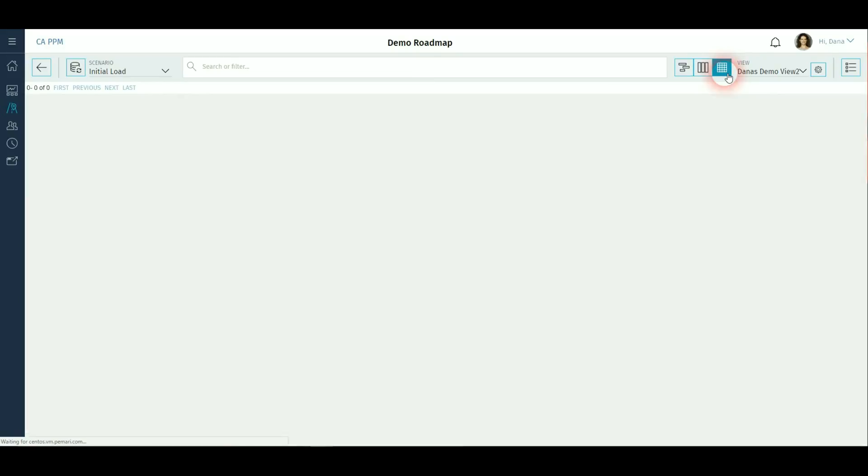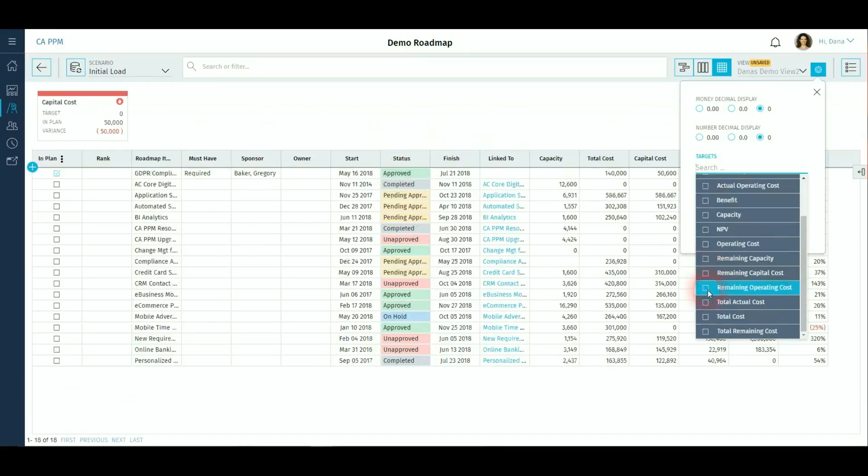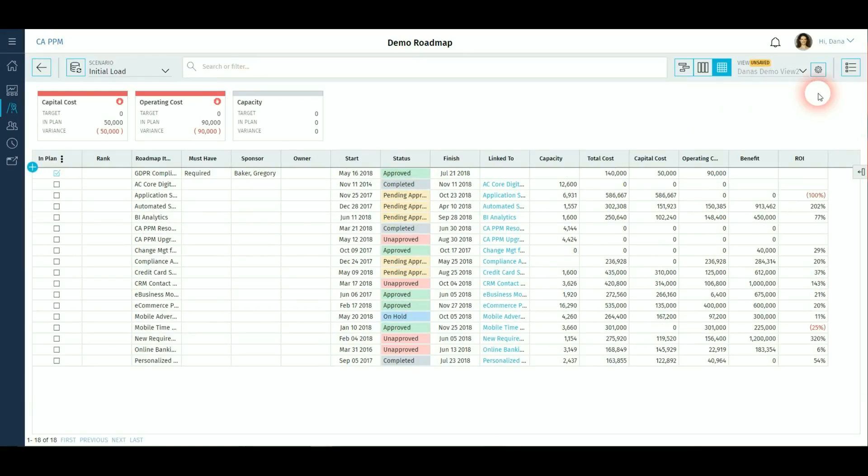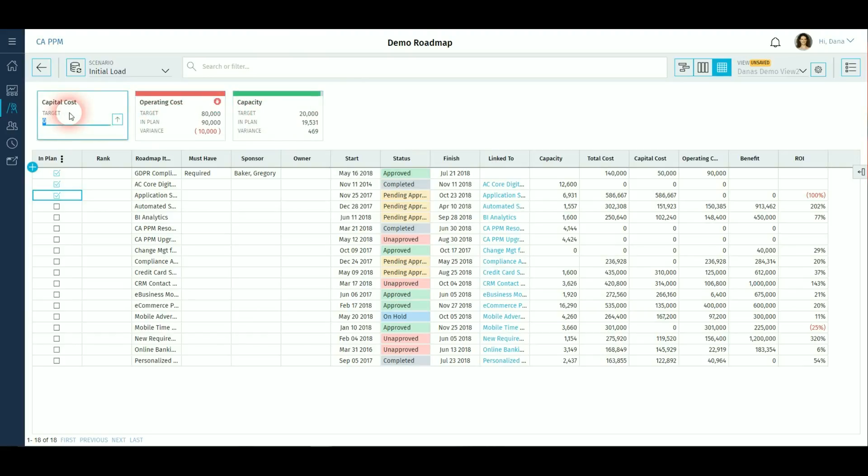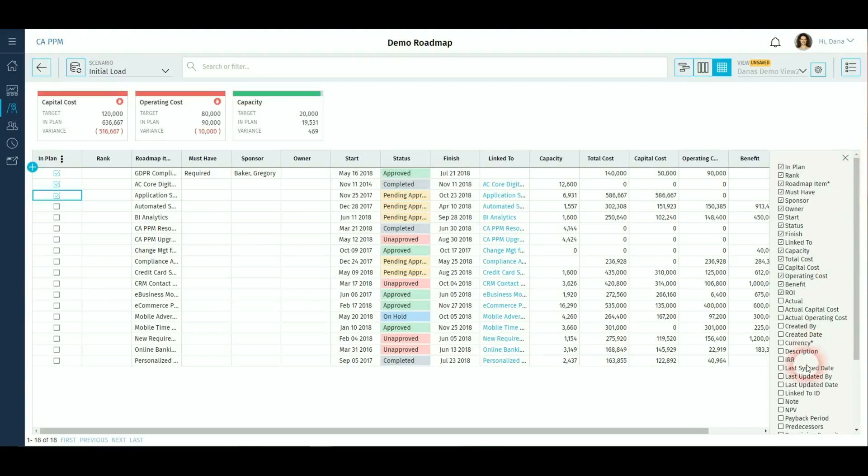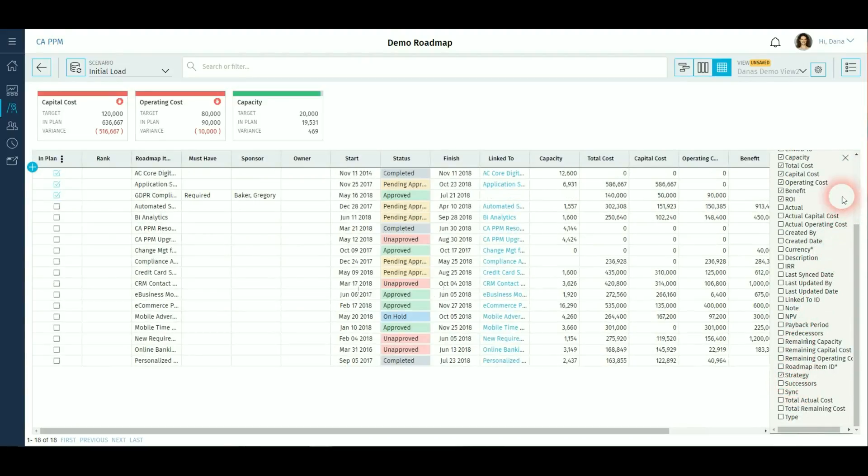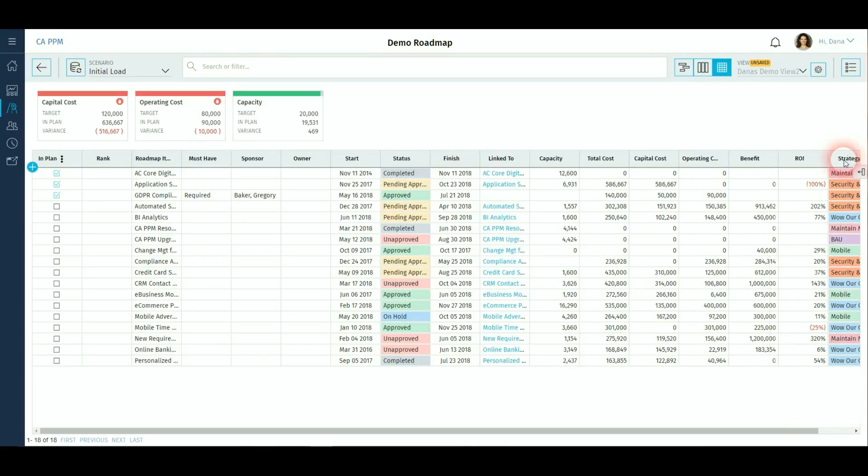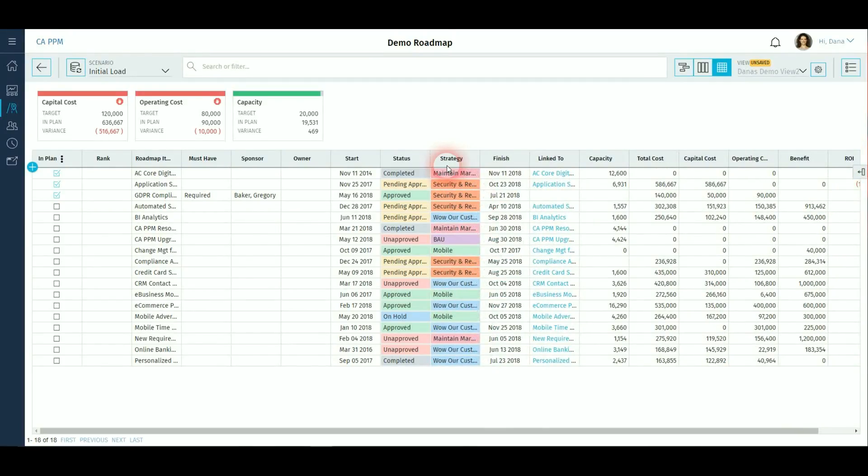And finally there is a spreadsheet view together with targets. These are set as either goals or constraints on money and number roadmap items. For example, benefits, capital or operating costs. Custom fields can also be included. New attributes can be pulled onto the view. Or if existing ones are not required, these can be removed from the view. These items can be relocated on the screen and edited in line.